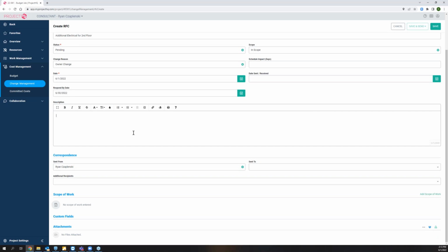And this is where we start to get into some of the variation in how these change orders can be entered. So right off the bat in ProjectHQ, there's 3 different printable forms. If I'm going to print or email this change order, you have 3 different selections to start with. Plus, you can create your own. You can have as many of these as you want. And in one of those forms, we're only printing the total amount of the change order. That's it, just the grand total.